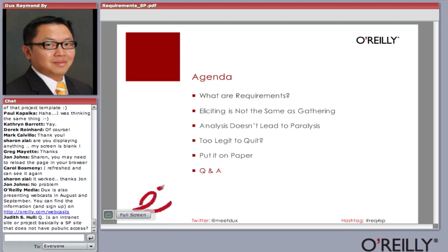Really, first of all, requirements are important. Look at 3 areas. Got to understand what the business needs are. Your boss telling you roll out SharePoint doesn't cut it. You got to poke and poke and poke. Once you have these business needs, nail it down to, okay, looking at the business needs, tying it to a SharePoint solution, identify user requirements. Things like how fast the response would be. What kind of logins do we need? Do we have external people, internal people? Because that would define if we're going to use Windows authentication, FBA, whatever.